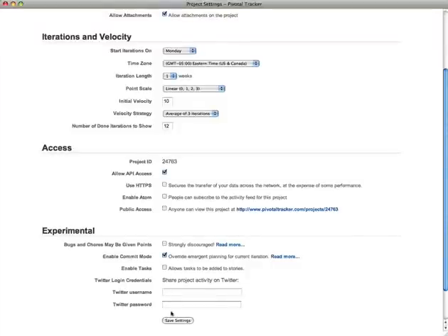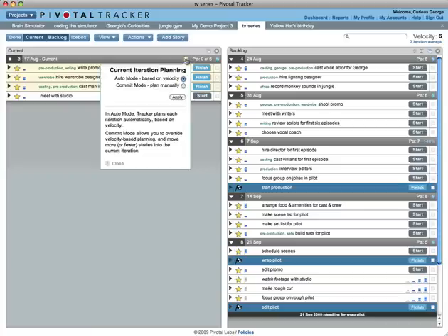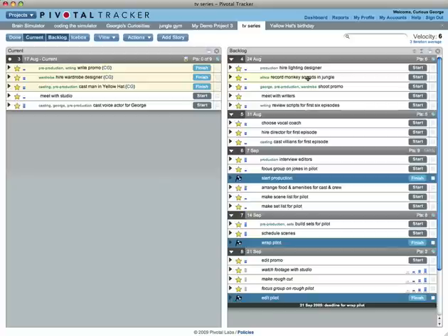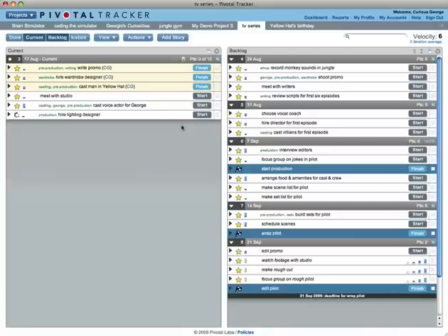If commit mode is enabled and you turn it on, you can then put any number of stories into the current iteration. When the next iteration begins, commit mode will be off. Unestimated stories count as 0 points. When you estimate them, your iteration boundaries will move.